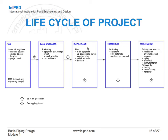Phase three of the project is detailed design. A 3D model of the plant is produced here. Nowadays this is carried out with powerful software tools that are able to integrate all the information of the project, such as drawings, list of materials, schedule, costs, etc. The next two final phases are buying all the materials, which is called procurement, and building the plant, which is called construction. It is important to note that after constructing the plant, there is some important work to be done regarding testing, commissioning, and handover.